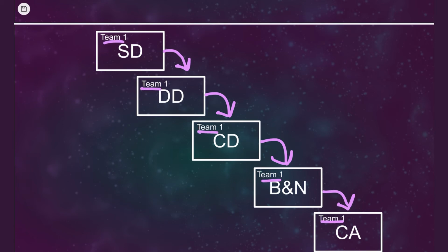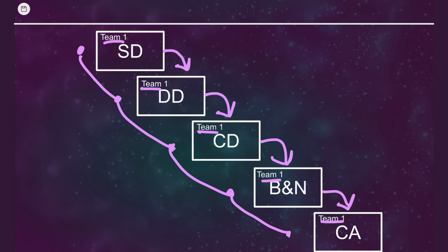The advantages of this sort of team is knowledge transfer stays within that same team, and there's continuity in the design intent. Whatever goals we created in schematic design, these get transferred all the way to the end of the project. Disadvantages include lack of specialists, since people share responsibilities and may be working in a number of roles simultaneously. Individuals become generalists, and finding generalists who are also specialists, well, that's a challenge in and of itself.